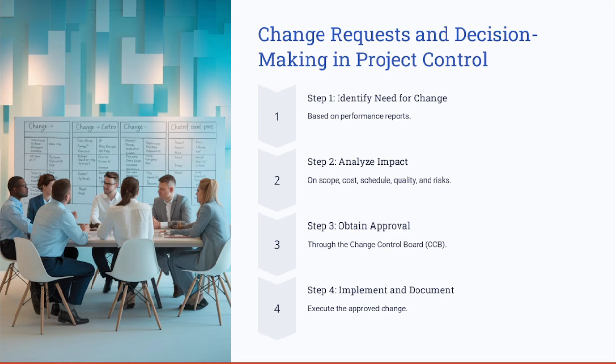Next, the step is to analyze the impact, or assess the impact on the scope, cost, schedule, quality, and risks. It's mainly assessing the impact of the change on the project constraints. After you analyze it, you document the change and its assessed impact.